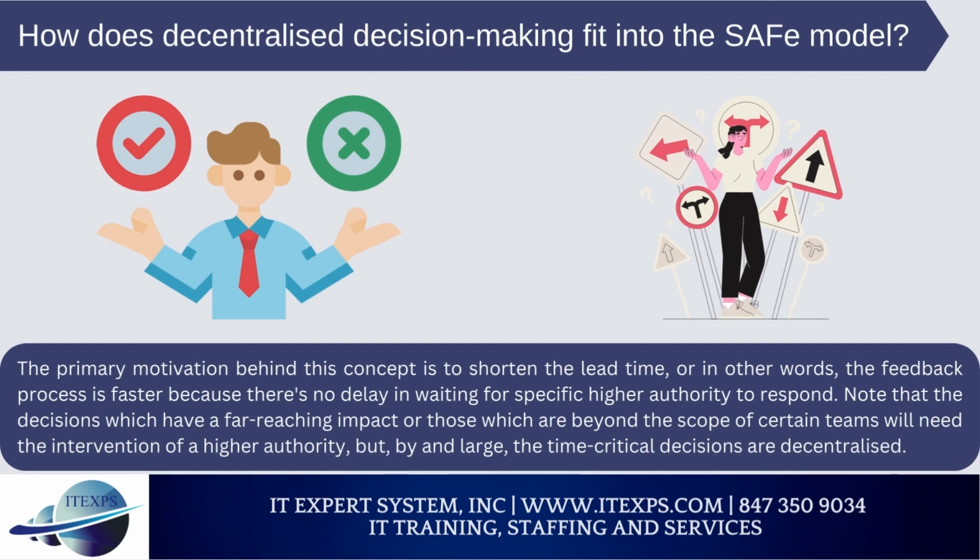How does decentralized decision-making fit into the SAFe model? The primary motivation behind this concept is to shorten the lead time, or in other words, the feedback process is faster because there is no delay in waiting for a specific higher authority to respond. Note that decisions which have a far-reaching impact, or those which are beyond the scope of certain teams, will need the intervention of a higher authority. But by and large, the time-critical decisions are decentralized.